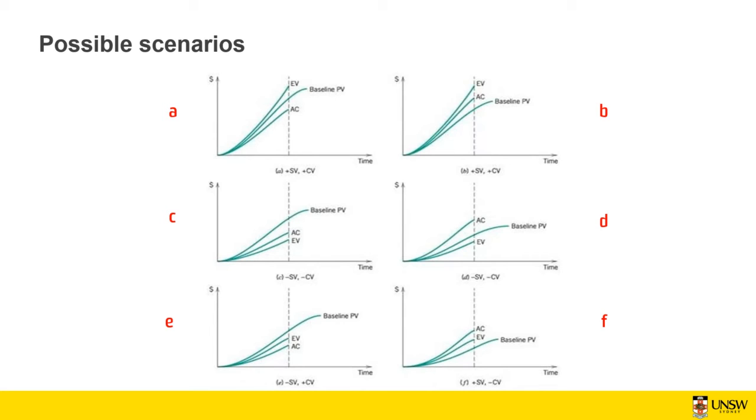But proportionally you spend less. That can be a scenario where you got some delays in starting the project, but you're not paying anyone, so you have contractors or vendors or something like that, and your running cost without doing anything is not that much.